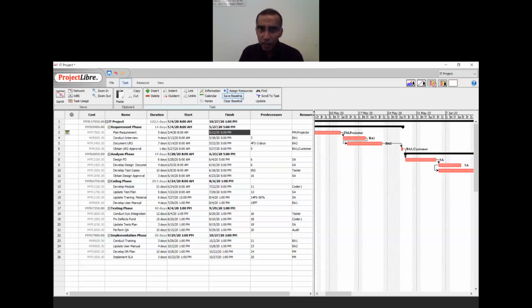Under the task, did you notice this word called save baseline? When you click save baseline, it will ask you what you want to baseline. Because this is the first time you are doing it, you baseline the entire project. Later, when you add a few new activities, you just baseline those activities. So for now, baseline the entire project.